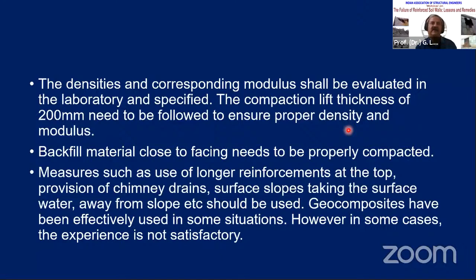And the other one is the lift thicknesses. In fact, I think this has been a big problem. The concept of the lift thickness is very, very clear: to ensure proper density and modulus, this is given. But if people want to dump in the night and then make it 600 mm, it is very dangerous. So it's very, very tricky, and that leads to a lot of problems. So the backfill material needs to be compacted. There should be some systems of evaluation, because you even have NDT methods also. So one should be very clear.